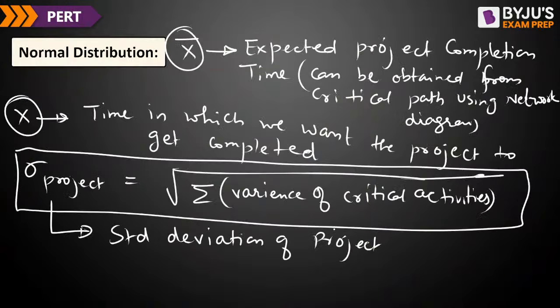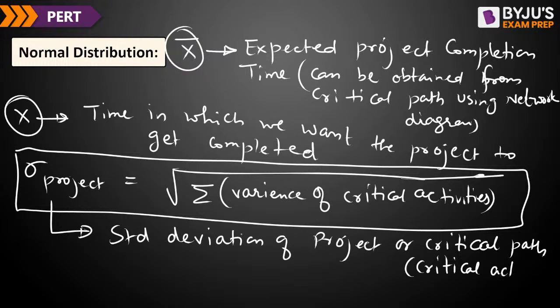Getting it? The standard deviation of the project is the same as the standard deviation of the critical path or the critical activities.